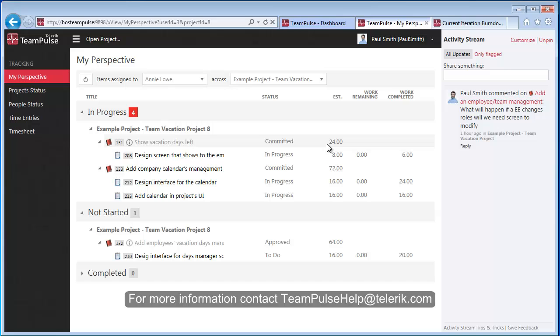So we might want to look into decomposing the work into small, more manageable requirements so that we don't have a potential problem. Because what would happen here, if she doesn't get to the 72-point story, then we won't deliver this huge amount of value that we have here.